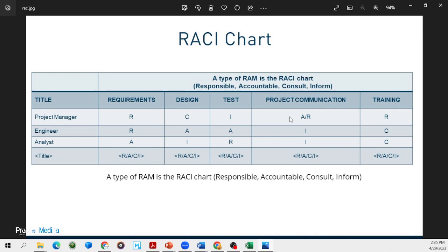What we cannot have in a RACI chart is two A's in any column. So when it comes to requirements, there's only one A. Design — only one A. Test — only one A. Communication — only one A. We cannot have two A's. Absolutely not. And this used to be one of the trick questions on professional exams like the PMP exam. You'd see a RACI chart and the question would be: what is wrong with this RACI chart? The answer would usually be there shouldn't be two A's in any one task.